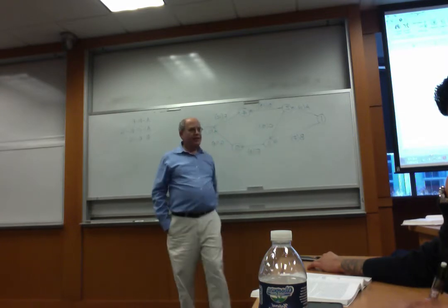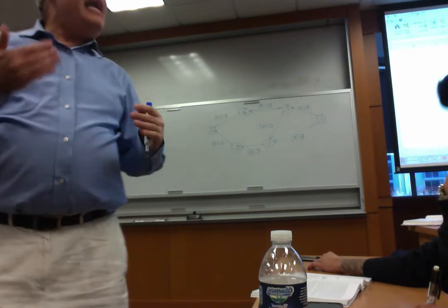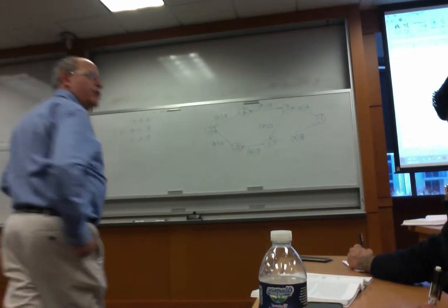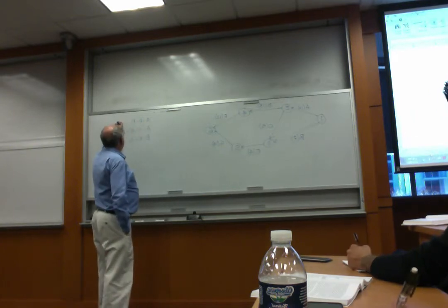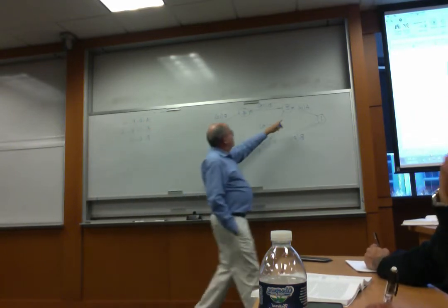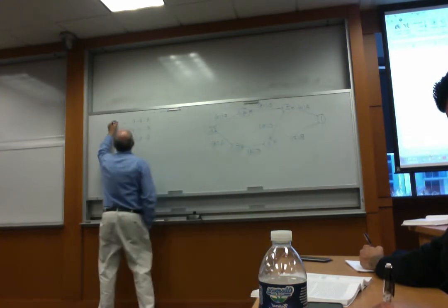So that's it. For a small problem, as I said, you just list. When I say enumerate, list each one of those paths. For each one of them, we can figure out what the length is. If we take the first one, A, D, F, we just add the lengths: 10 plus 13 plus 12.